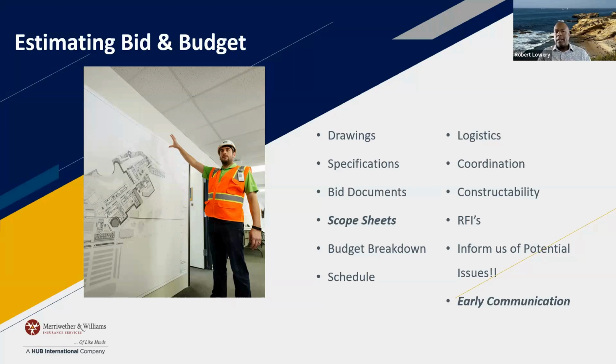That's one thing. And then as I mentioned earlier, if this job is 6-7 months away, you need to know what that escalation cost is going to be on material and labor and factor that into your price. Because you do not want to say, oh, I didn't cover that, 6 months down the line. You're going to be losing money because you didn't account for that as you're bidding the job. So you've got to do your due diligence while you're bidding and putting your estimates together to get the numbers of where it's going to be.